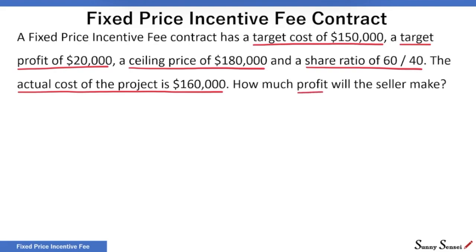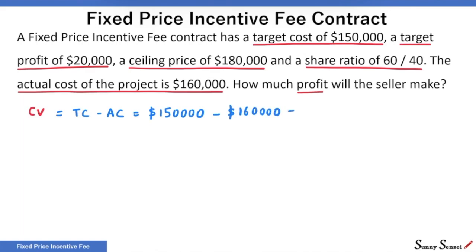It is always best to start with the cost variance. The cost variance tells us how much the actual cost differs from the target cost. Mathematically, cost variance or CV is simply target cost minus the actual cost. Our target cost is $150,000 and the actual cost is $160,000, so the cost variance is minus $10,000.